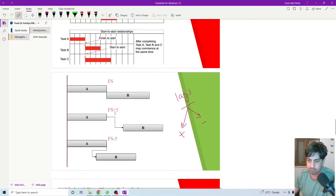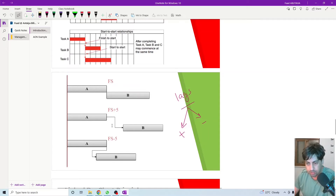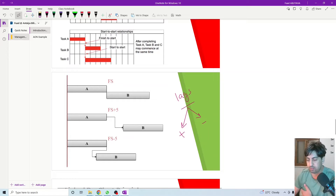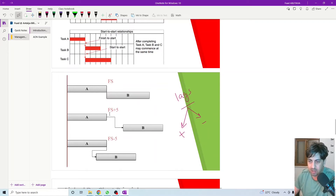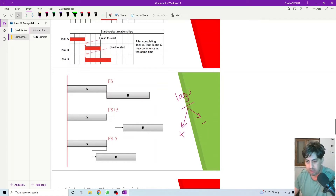It means I need five days between the end of activity A and the start of activity B. So when activity A finishes, I need to wait five days, then activity B can start. This is a positive lag. In other words, activity B will start five days after completing activity A. So when I complete activity A, I wait five days and then activity B starts.